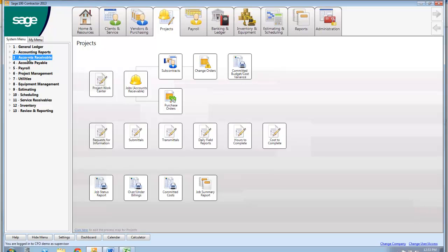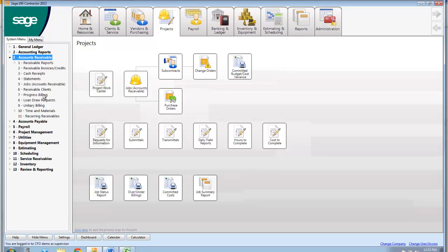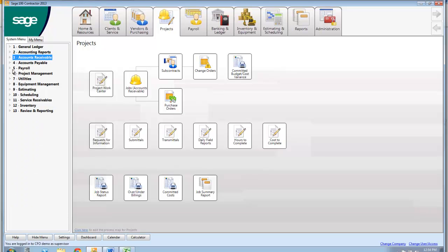Full accounts payable, accounts receivable, a couple ways to bill. I can do a progress billing. So if you have line items where you have a painting item and you're billing 30% or 40% complete, you can bill that way. If you just bill one time and say painting's done, pay me my X dollars, you can bill that way. And we do have a time and materials module that's included as well. So if somebody says, I want you to do that on time and materials, and you negotiated your profit margins and overhead rates for the individual line items, you can track all of the costs going through the system to that job. It will accumulate it, list it out on the invoice, and then put the right profit margins on there. Full financial reporting, financial statements, the whole works.